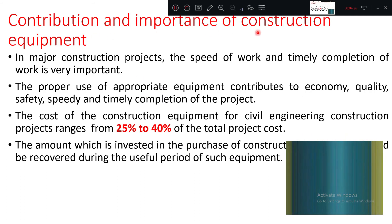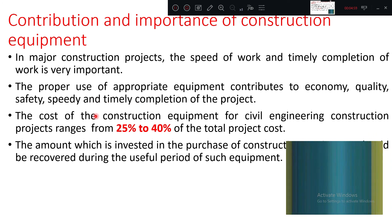The contribution and importance of equipment: in major projects, speed of work and timely completion is very important since they are time-bound. The proper use of equipment contributes to economy, quality, safety, speed, and timely completion. The cost of equipment in engineering projects ranges from 25 to 40 percent. Previously it was 15 to 30 percent, but nowadays mega projects rely heavily on equipment, which is why the share has increased.